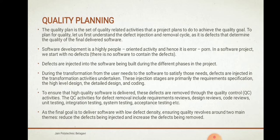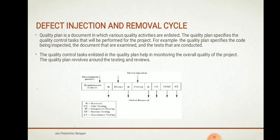Our final goal is to deliver software with low defect density, ensuring quality. This revolves around two themes: reduce the defects being injected, and increase the defects being removed. Quality planning is a document in which various quality activities are enlisted. The quality plan specifies the quality control tasks to be performed for the project — for example, the code to be inspected, the documents to be examined, and the tests to be conducted.